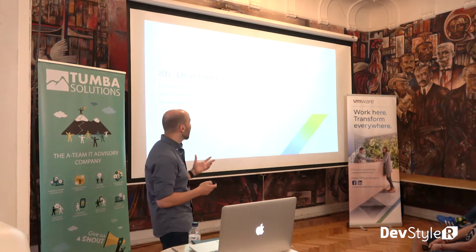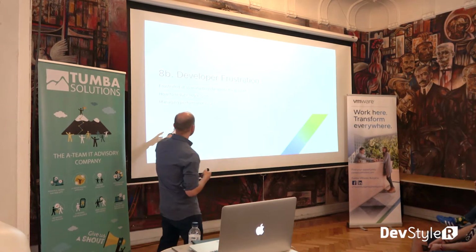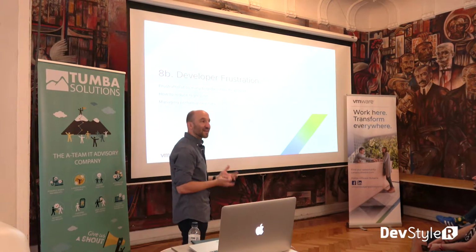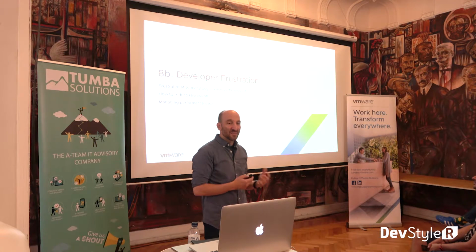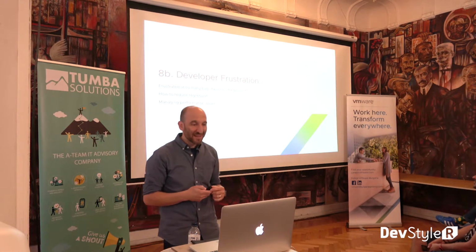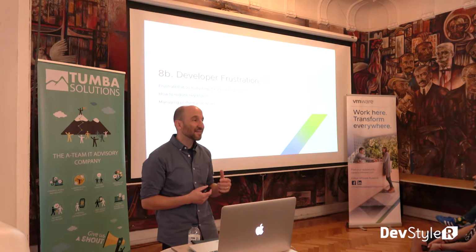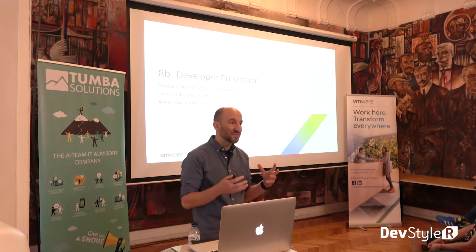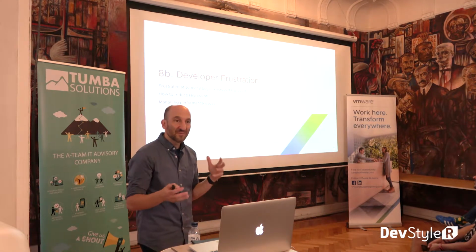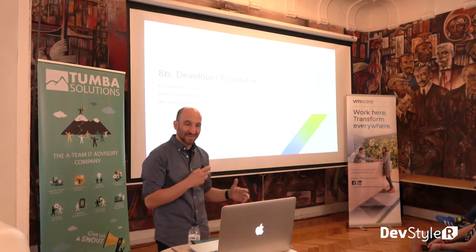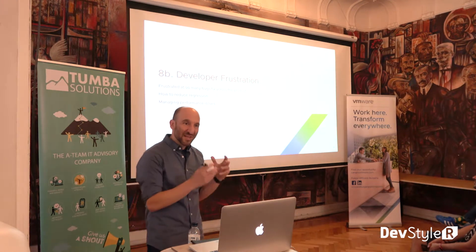And so as part of that, let's say it's a sub point, as part of that we get a lot of bugs. And the developers were getting really frustrated with how many bugs we had and how long regression was taking. At this time, regression was taking 2 weeks. So we're trying to release every month. We're not making it. We're late all the time. And regression is taking forever.